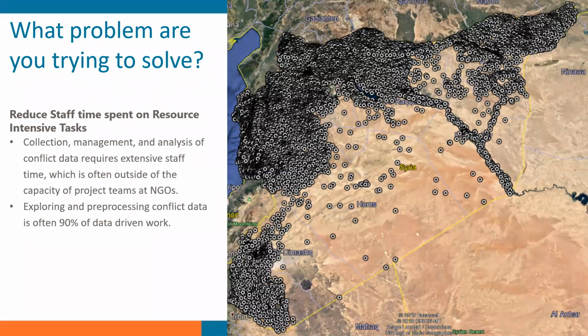However, halfway through the conflict, the UN decided that the original 5,700 or so locations were insufficient for providing the necessary support and analysis on the conflict. And so they added about 2,000 new locations. At the time, our team was low on staff time, and we had fewer staff than we have now even. And it was deemed impossible for us to backdate and update all that information. And so we just kept maintaining the original 5,771 locations, but didn't go back and attribute those things to the new locations. Unfortunately, this meant with each month that we went by, this task became a larger and larger task and became more impossible for just our team to take on alone in light of all of our ongoing activities.